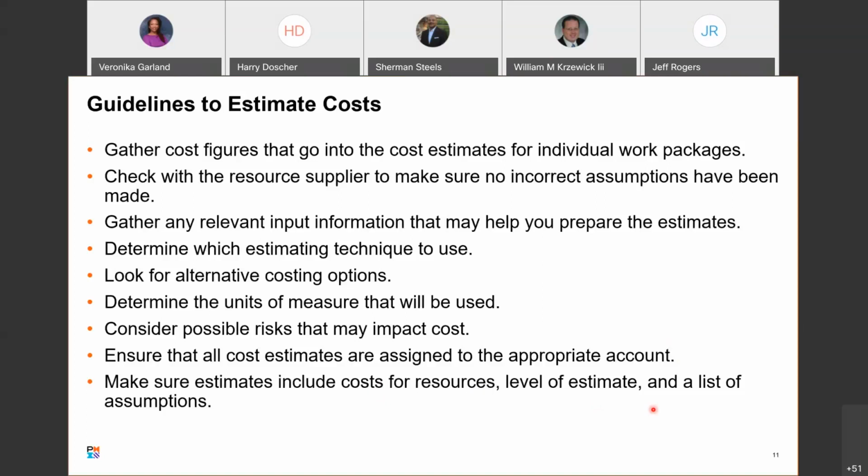Assuming that there's a direct linear scale from a previous project, here's what our estimates are based on that, something like that. Any of your assumptions. Or again, if you're building a road, assuming that the price of gravel will stay flat from the beginning of the project through the end of the project. Things like that.